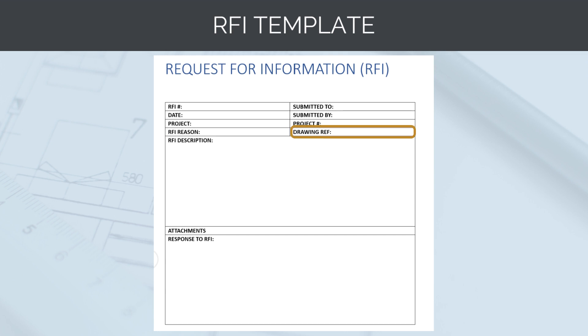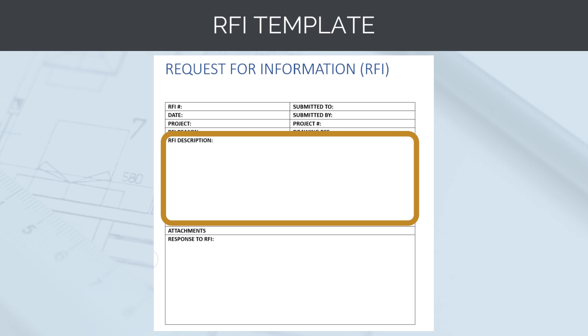Next, we need to note the drawing reference. This is the drawing or drawings that are affected by the RFI. Then we need to complete the RFI description. What is the actual question we are asking and what information do we need from the design team?